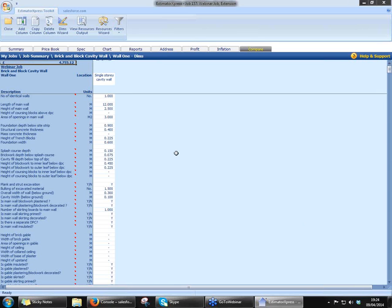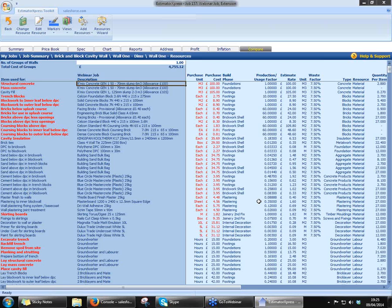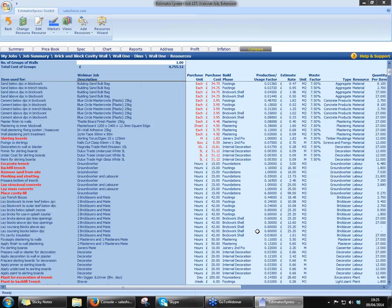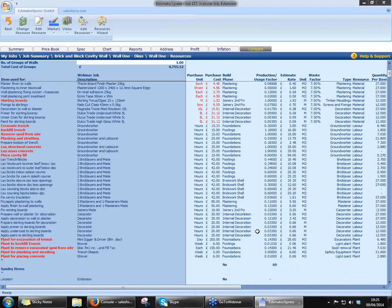It's costed out that 12-meter wall at £4,755.12, as you can see just at the top there. That is ex-VAT and profit — your VAT and your profit don't show until the end when you actually produce the quote for the client. Now if you want to have a look at what's actually gone into that workbook or that calculator, click on View Resource Output at the top. And that's told me every product, every material, every tradesperson, and every piece of plant that's going to be involved in building that wall. So you can see exactly what you've used, exactly what trades you're using, what they're going to be doing, how long it's going to take them. Even things like your shovel — you don't buy a new shovel at every job you do, but you've got to factor in for wear and tear. So why not factor a few quid into every quote that you wouldn't necessarily think about if you were doing this manually?